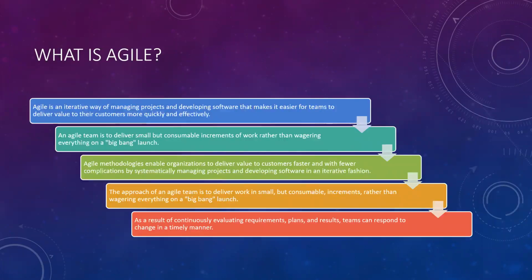So one day for testing it, and one day to get the test cases reviewed, and we need to implement the feedback we got from the manager or somebody else who is reviewing the test cases. On the fourth day, we'll get the application, and the developer will be waiting for a set of defects reported by the testing team. On the fourth day testers will be testing it, and at the end of the fourth day we give some defects to the development team. On the fifth day we'll still be testing, and meanwhile the developer will be fixing them and will give it to us in a newer version.